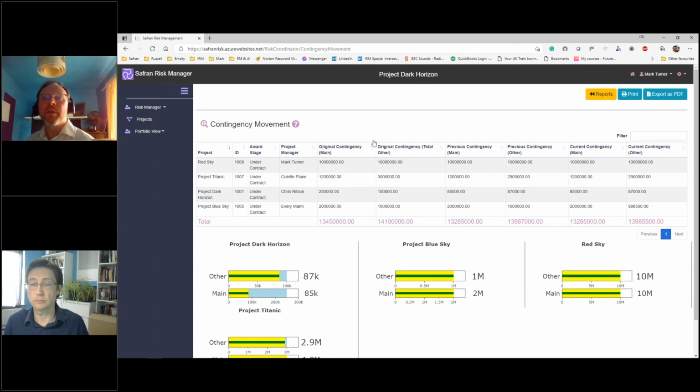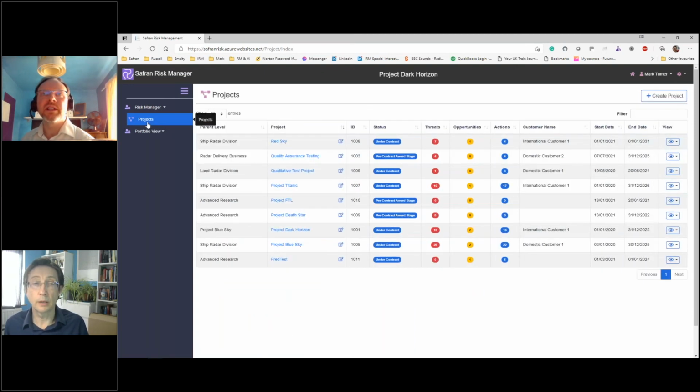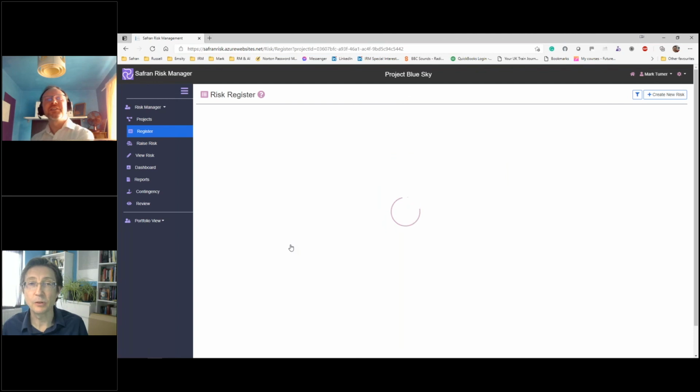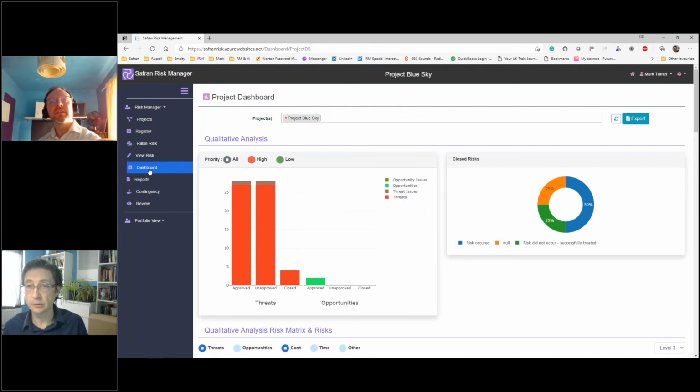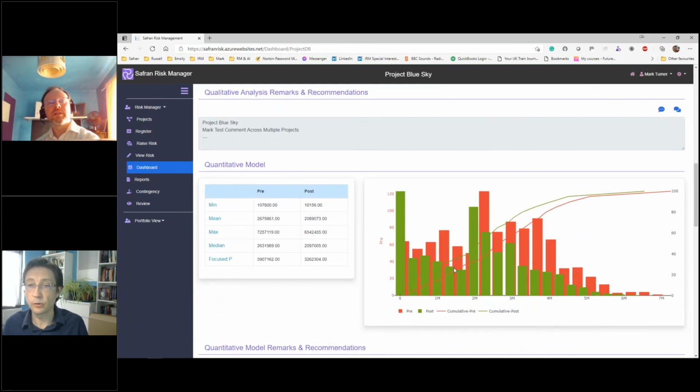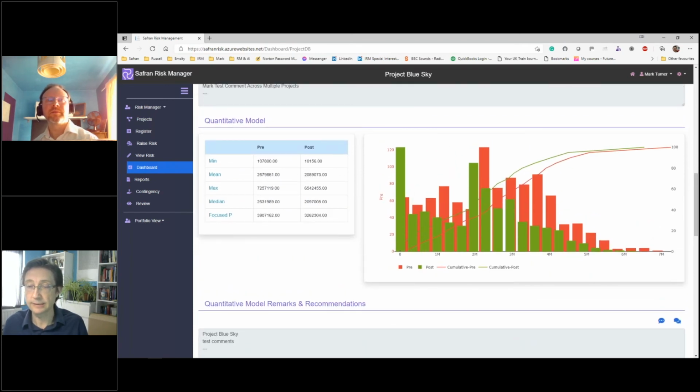Okay. There's a question about opportunities and are they incorporated into the Monte Carlo simulation? I think that's just a straight yes. In this, as I said, that is correct, isn't it? Need to contradict there, Chris. Okay. Monte Carlo on the dashboard will only take into consideration threat cost data. It would not be appropriate to offset threat impact data with opportunity, which may or may not be seized upon. So for the very basic Monte Carlo analysis on the dashboard, we only look at threat cost impact.